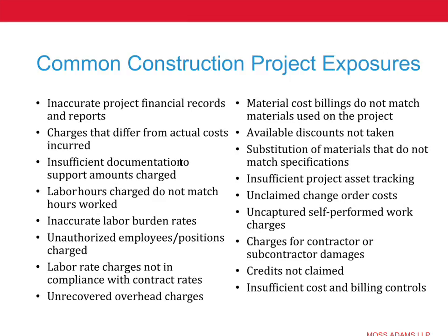The other bullets here are directly related to that, whether it be documentation for work charged on the job cost report or labor hours that do not match the hours worked. We run into that quite often. When we do our work and we're looking at charges on the cost reports, we use computer-aided automation techniques, CAT tools, to look for anomalies and issues in the labor hours and in the data that's there. And we often find things like people charging more hours than they could possibly incur. I remember one instance where I saw somebody charging more than 24 hours in a day.